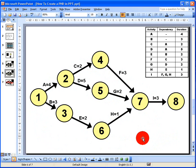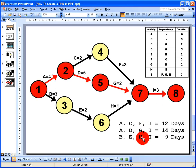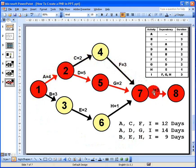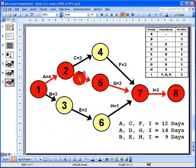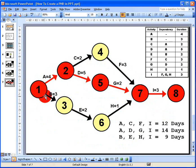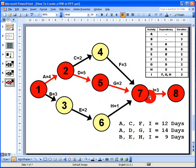Adding up the durations: path A, C, F, I totals 12 days; path A, D, G, I totals 14 days; and path B, E, H, I totals 9 days. The longest path — highlighted in red — is A, D, G, I at 14 days. This is the critical path, and it also tells us the overall duration of the project is 14 days.